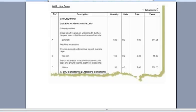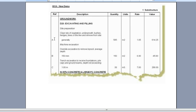Here we see an example of a Bill of Quantities. Note we would have the title of the project at the top left hand corner of the page. On the right hand side we would show the element or area in which the works are taking place, so the Bill of Quantities can show us the location of particular aspects. We have the heading from the standard method of measurement and then the subheading. We have a reference — page one, item A — the description of the works, the quantity, the unit of measurement, and the rate multiplied by the quantity giving us the overall value.